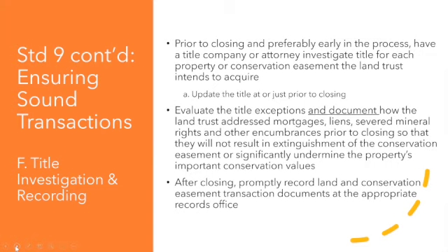While it's best practice to conduct the title investigation early on, it's also customary to update the investigation just before closing, in case any encumbrances were placed in between the initial investigation and the time of closing, which is often months, if not in some cases years later. So this is sometimes called doing a bring down of that title, and should be done like the morning of, just prior to closing. Finally, following closing, it's important to record the legal documents in a timely manner to make sure that the organization's interest in the property is known and protected.